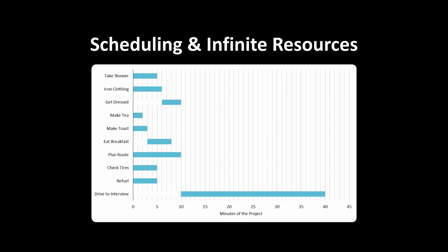Probably won't get the job, very much depending on what that interview is for. So infinite resources really can help us shorten the duration of our project, but of course resources cost money. So there is always going to be this balance between the amount of time something takes and the amount of money it's going to cost for us to be able to do that.